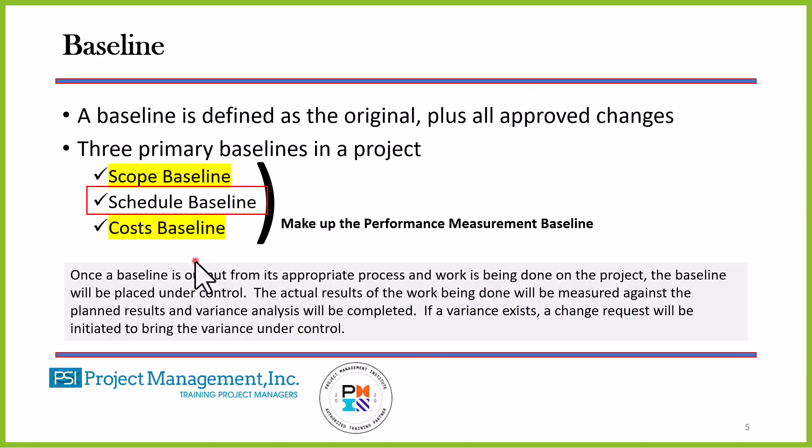This is important: our schedule baseline, which contains the project network diagram as a part of it, is one of the triple constraints — one of the baselines. These three baselines together make up what we call the performance measurement baseline, which tells us how the entire project is performing.